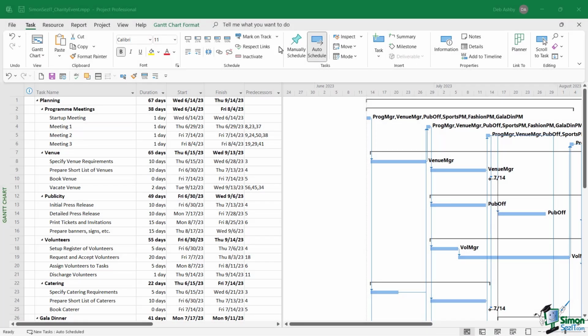In the previous lesson, we discussed the reasons that you might want to split up a project or join together a project. And we recognise that it's important to deal with resources. The key issue here is that when we split a project, we need to make sure that those projects are using the same resources. And the way that we do that is to set up what we call a resource pool. Once we've set up a resource pool, we can then share that resource pool amongst several projects.